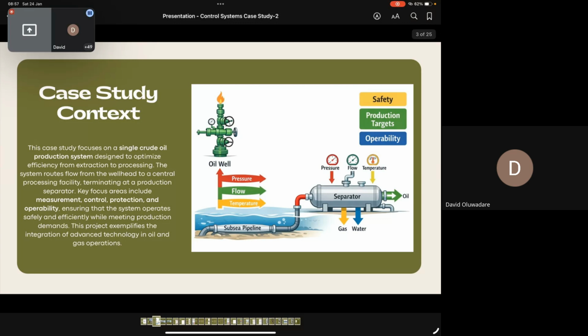And I agree with you because there is a time whereby we were done with construction. Now we are in pre-commissioning. From pre-commissioning to commissioning, it took about 1 year, 6 months. Yes, because from when we start introducing the gas, they will say, oh, they need to cut this place. Oh, they need to shift this one. Oh, the pipe is now bigger than what we thought. Reduce it again. Change this valve. Change this controller. You understand? So you cannot say that we are already 90% and now say you are going back to 50%.